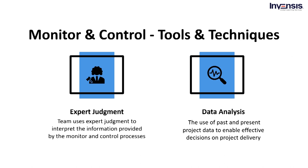Finally, we have variance analysis. It reviews the differences between planned and actual performance, including time period estimates, cost estimates, resource utilization, resource rates, technical performance, and other metrics. Variance analysis can be performed in any area of knowledge based on specific variables. It checks for deviations from an integrated perspective when monitoring and controlling project work, taking into account cost, time, technology, and resource deviations to get a complete overview of project deviations, allowing you to initiate appropriate preventative or corrective action.